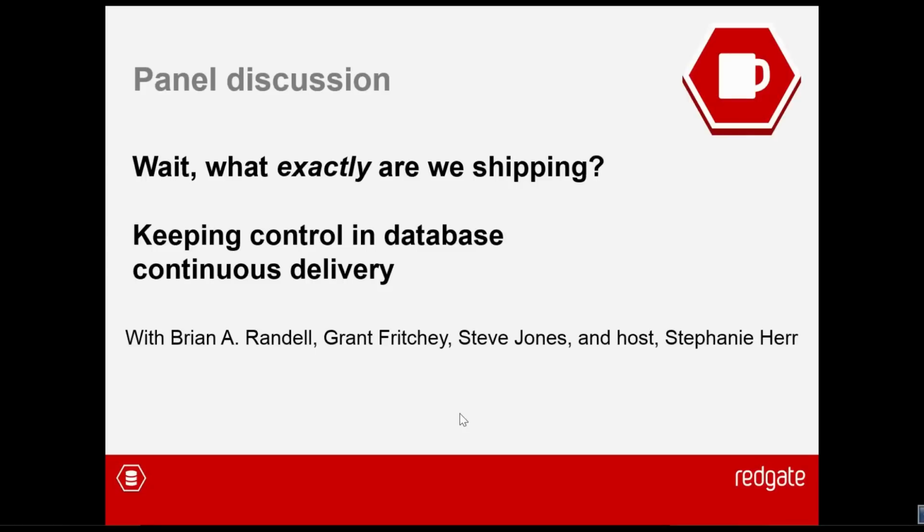Well, but that's why good tooling makes sense. If you have a system, TFS does a good job. When I make a check-in, I have the ability to associate it, and I get traceability both ways. I can look at it from the source code view and go back to the requirement, the work item that was requested, or from a project management perspective, I can come down from the requirement, the PBI, the user story, and see it that way. So once again, it's a combination of tooling and process, and then yes, the people have got to use it correctly.